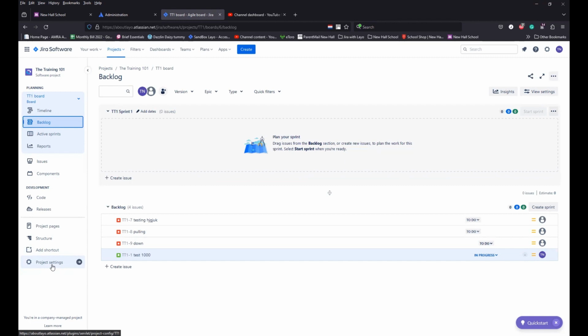What we do recommend when it comes to administrators of projects is that most likely your Scrum Masters and product owners would be administrators, or would have the ability to help you manage your board in terms of your sprint, starting your sprint, stopping your sprint, and stuff like that. So your Scrum Masters and product owners would have the permission to do this. If you want other team members within your team to also have the ability to do this, then you would need to give them the administrator role, so that they then have the permission to help you manage this going forward.